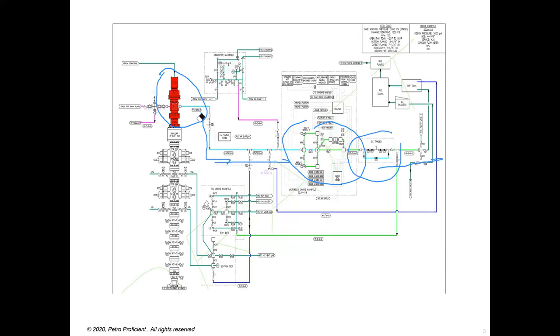So this is something you have to keep in mind when you're discussing with anybody, that we will not cause any interruption to the drilling operation. We will do this offline. And then this one, obviously, you need to stop the drilling operation or tripping operation or casing running operation, cementing, any operation that you're doing needs to be halted. And this RCD and the line is connected. All these lines, other interfaces, are usually done offline.